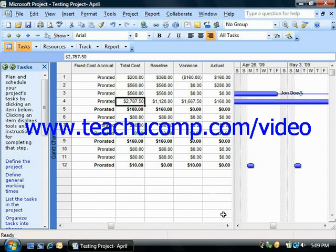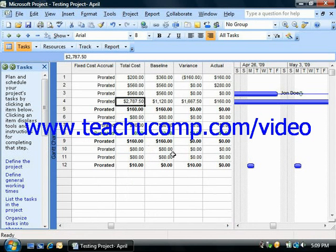Now, generally, some of the most important costs requested regarding a project are shown in the costs table. You can also generate reports that display this type of data within Project as well. You can see baseline costs, which are the scheduled costs saved as part of the project baseline. You can also see current costs, which are the costs scheduled for the task. After costs have been incurred, this shows the actual cost plus remaining cost, displayed in the cost or total cost column.